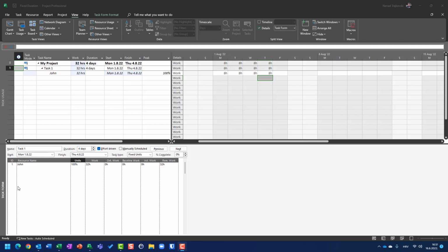I have John, who is 100% assigned, and the total work is 32 hours, effort-driven. Now I'm going to say, okay, I need Mary, but she is supposed to work 50%. It means that her maximum is 4 hours per day. So you will see that the duration will be 2.67 days.